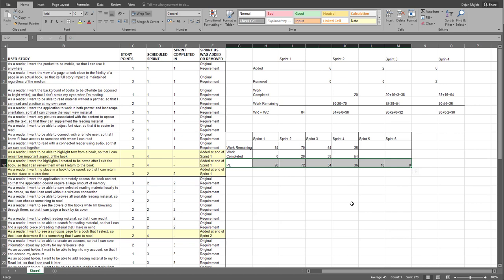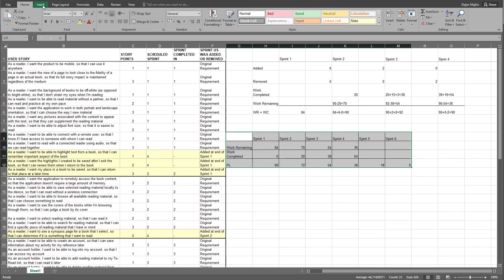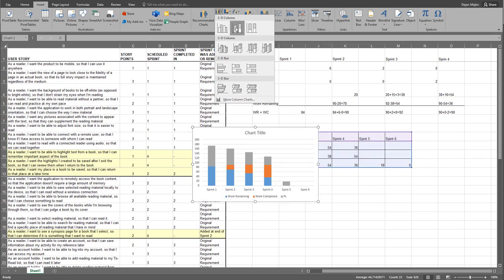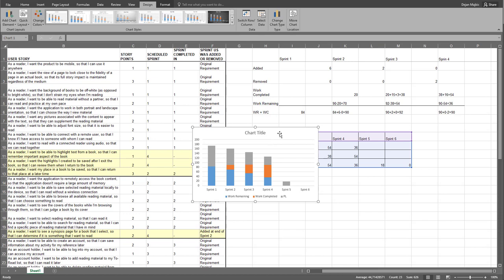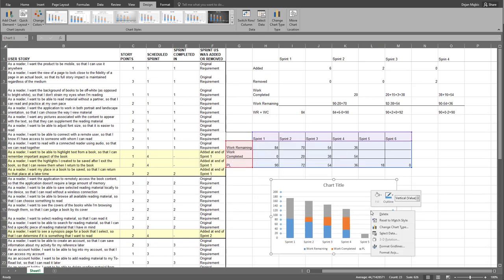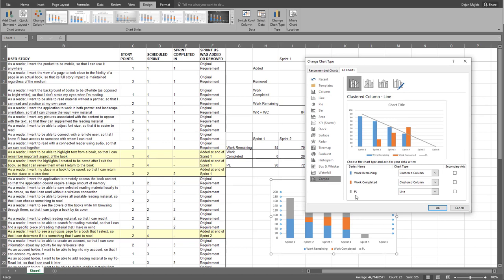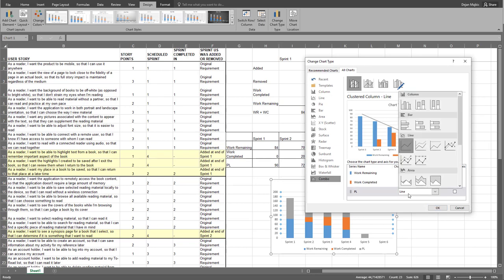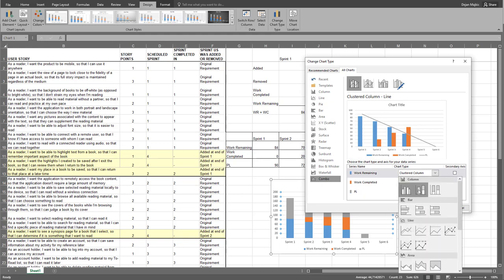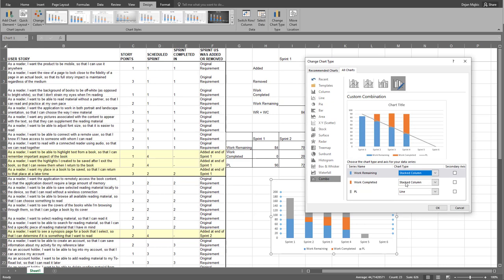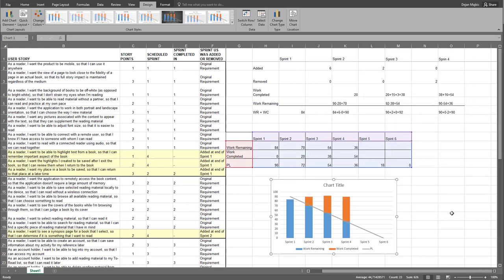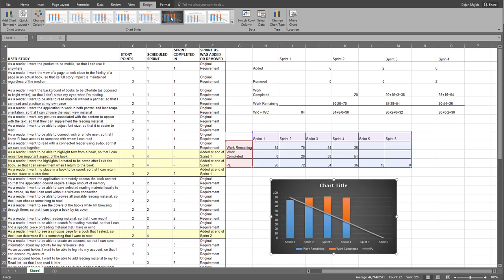Now we are ready to create our burndown chart. Select all this data, go to Insert, go to Chart. Right-click, change chart type, click on Combo. From the prediction line, choose Line. For the work remaining, choose Stacked Column. And also for the work completed, choose Stacked Column. Click OK. This is our first chart. We can change the format here so it stands out a little bit more, and we can change the chart title. And this is it.